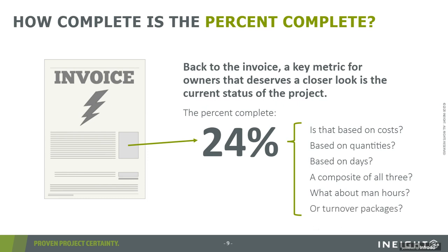Or another one, in today's large oil and gas and chemical projects, we see a lot of talk about advanced work packaging and what that's doing for delivery. So is it based on turnover packages? There's any number of ways that percent complete can be calculated.